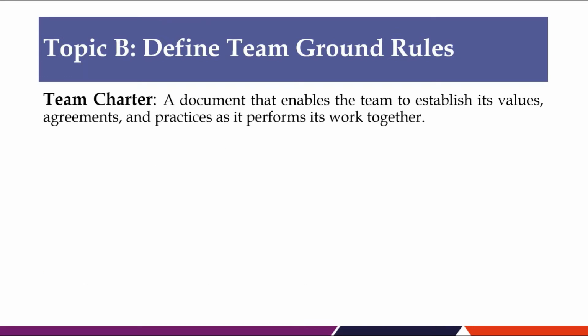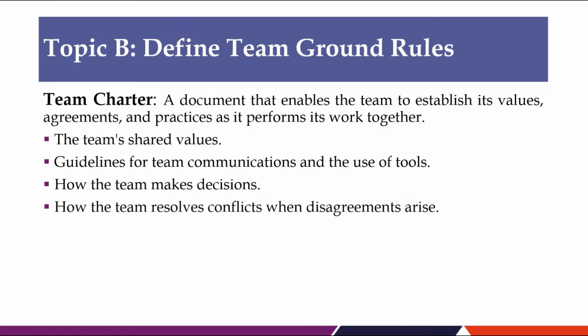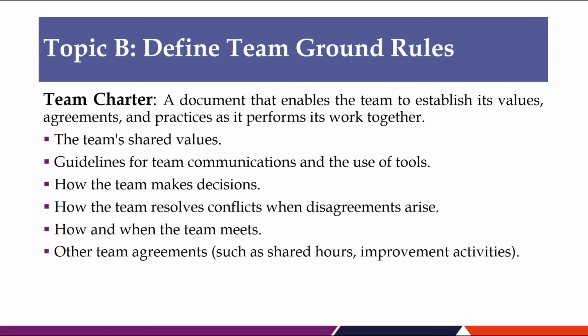The team charter is a document that enables the team to establish its values, agreements, and practices as it performs its work together. A good team charter should include the team's shared values, guidelines for team communications and the use of tools, how the team makes decisions, how the team resolves conflicts when disagreements arise, how and when the team meets, and other team agreements such as shared hours, improvement initiatives, and activities.